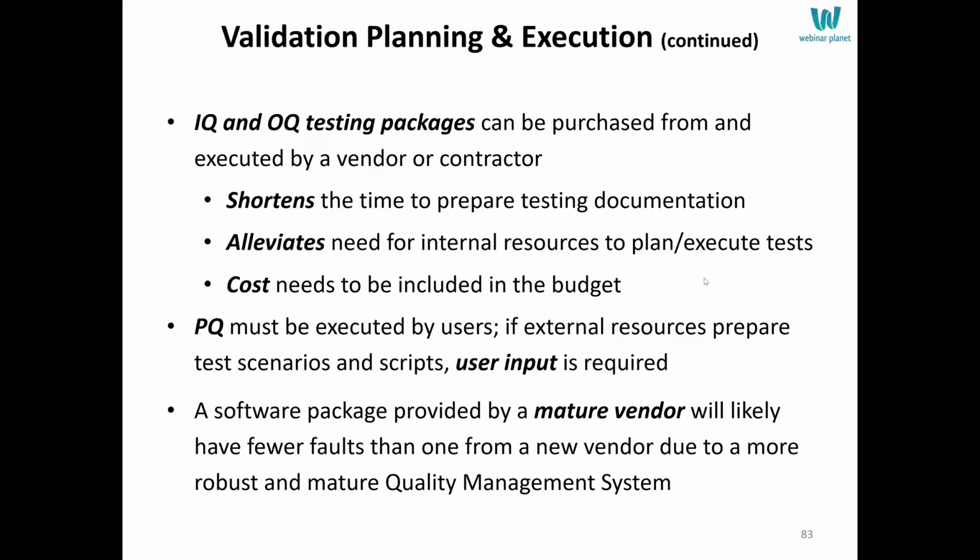However, when you get to PQ, you can have external resources prepare your PQ protocol and summary report. They can prepare the test scenarios and scripts, but only if they get direct input from your subject matter experts. And that has to be documented. Once they get that input and write the PQ protocol, they can't execute it. Only the subject matter expert can execute that protocol, but the external resource can write the summary report.